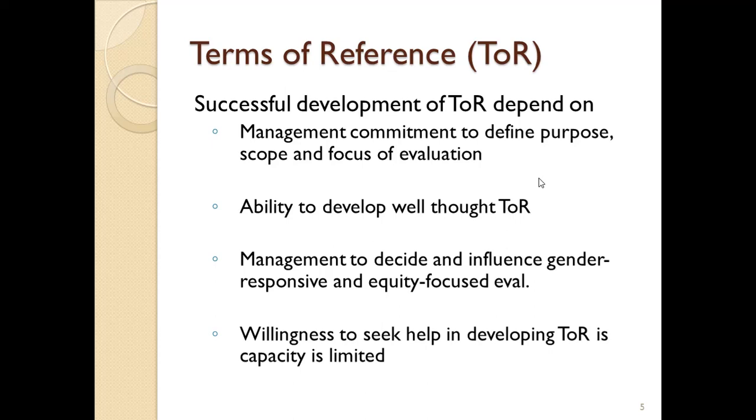of evaluation. The purpose in terms of why the evaluation is needed, scope in terms of timing, scope in terms of evaluation on geolocation, scope in terms of thematic content that would be covered, scope in terms of coverage of the intervention, for instance, what aspects are going to be covered, scope in terms of target groups for evaluation, and other kinds of scope. Also a focus of evaluation in terms of whether it is basically aiming at looking at equity and also looking at gender integration within the evaluation processes.